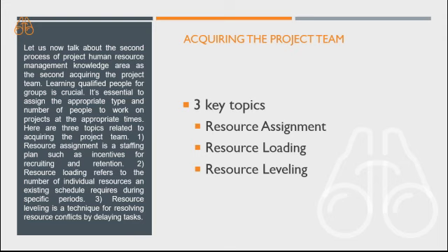Number 1, resource assignment is a staffing plan, such as incentives for recruiting and retention. Number 2, resource loading refers to the number of individual resources an existing schedule requires during specific periods. Number 3, resource leveling is a technique for resolving resource conflicts by delaying tasks.